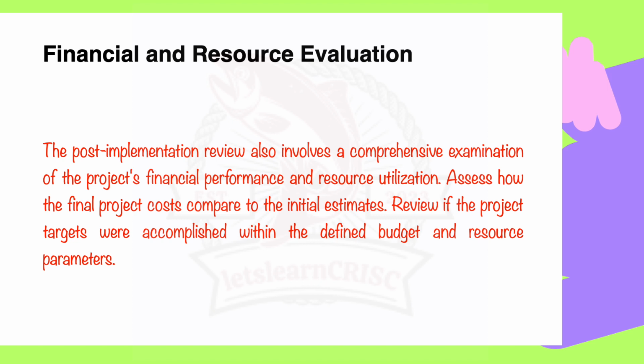Right? Think of it as evaluating whether a road trip stayed within the planned fuel and time limit. Did the project reach its destination without going over budget or using excessive resources? So in simpler terms, we can say that for financial and resource evaluation, post-implementation review involves comparing initial cost estimates with actual expenses and ensuring that project goals were achieved within the defined budget and resource constraints.